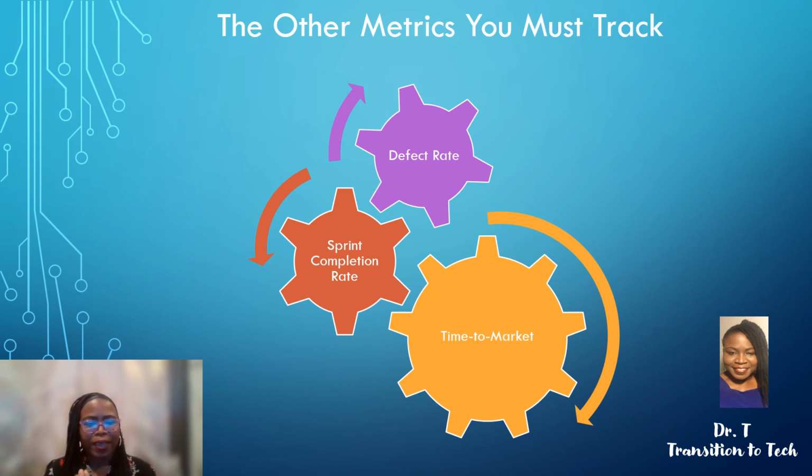If you start seeing a pattern of this as you're moving through sprints, it's time to stop and think about, is the dev team really informed about the scope and what's to be delivered? Are the user stories really capturing what the acceptance criteria is? Because maybe there's a gap there. But to truly understand what's keeping us from continuously delivering quality, you need to look at the defect rate and understand this metric throughout the sprint and throughout the release schedule.